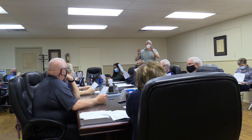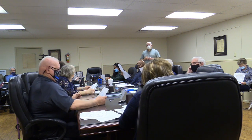It is for changes to the millwork, to the judge's office, and we added some partitions. Outside the large courtroom, we've got surface mounted conduit and boxes in places for televisions and fire alarm and stuff, and right outside the main courtroom, it'd be nice if we could conceal some of that, so we added some partitions to hide the electrical conduit. We also had a couple of places where the old light fixtures used to be and they were not centered. Just an annoying little thing that drives me nuts, so we want to center those lights because everybody will notice, why on earth did they not center those lights. So we're spending a little bit to correct that.